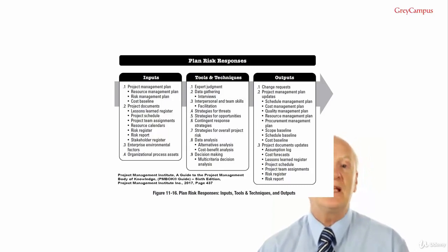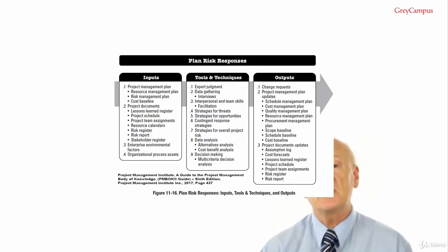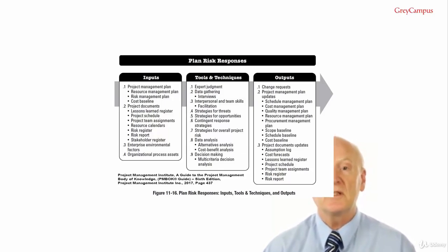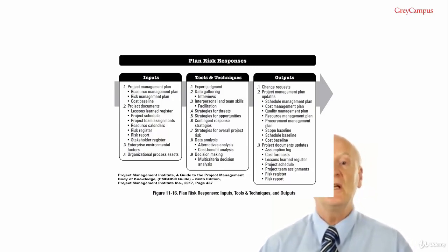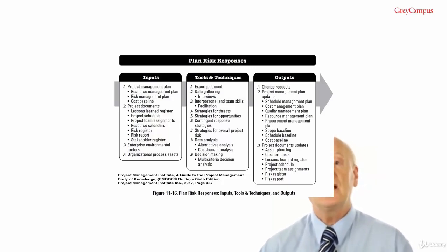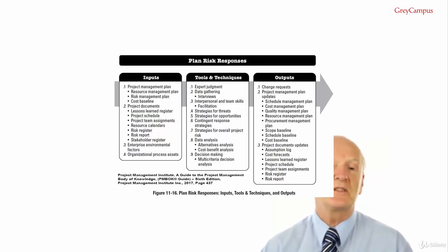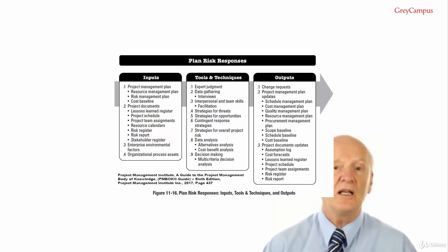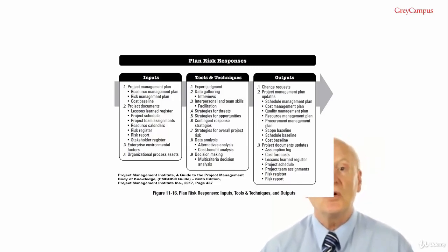Cost-benefit analysis. If the impact of an individual project risk can be quantified in monetary terms, then the cost effectiveness of alternate risk response strategies can be determined using cost-benefit analysis. The ratio of change in impact level divided by implementation cost gives the cost effectiveness of the response strategy, with a higher level of ratio indicating a more effective response.